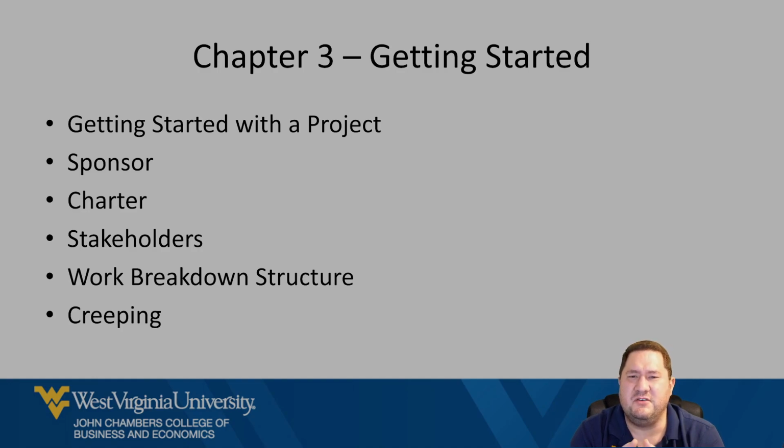This charter also gives the project manager the authority to do the work. So that's very important right there. The charter gives the project manager the authority to do the work, do the project. It outlines the budget, probably will outline things such as if you want to spend more than this amount of money, you have to get approval from the sponsor, or little details that might be company specific.